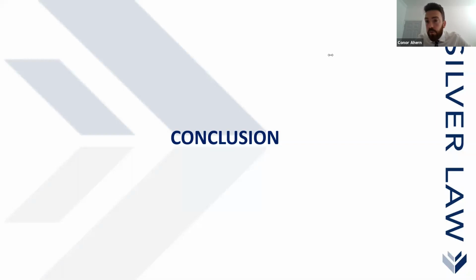A starting position is to produce a program analysis to show when you should have got the information and when you actually did get it. I think you'll start to build a really strong case that the contractor's position is correct, and that the employer is almost trying to create an alternative set of facts in order to keep his liability for loss and expense as low as possible. So I think that's where you'd start, and you just build up your case from there.